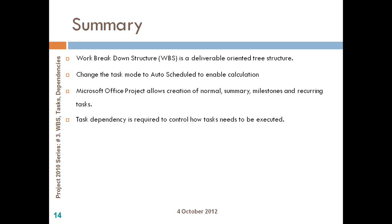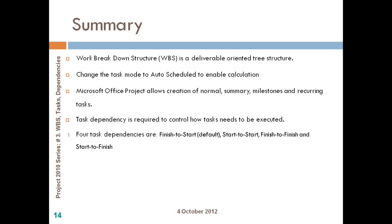We talked about dependencies, where we said it can be finish to start, start to start, finish to finish, or start to finish dependencies, which you can try to make use of the task information form or the drag and drop option to set your dependencies.